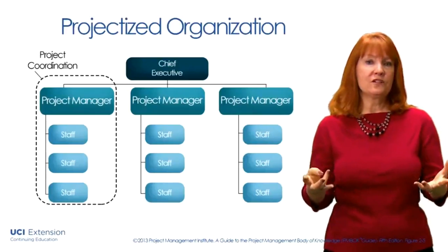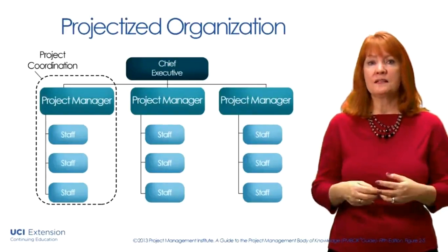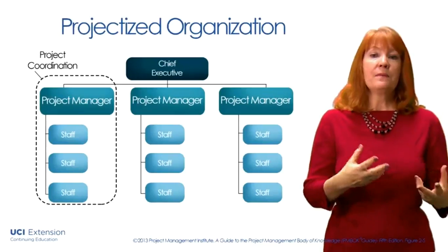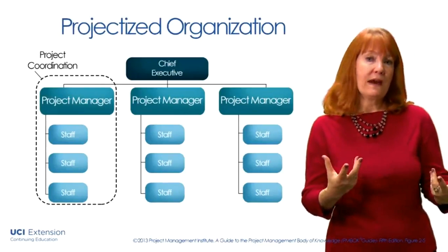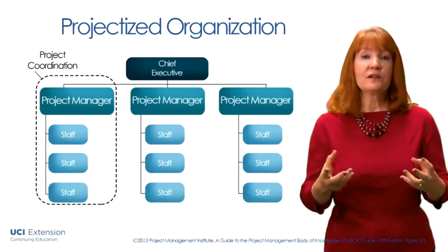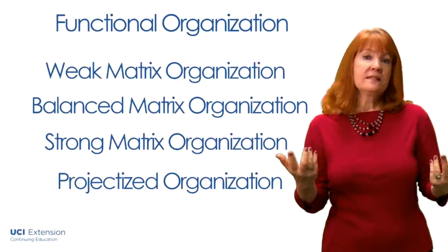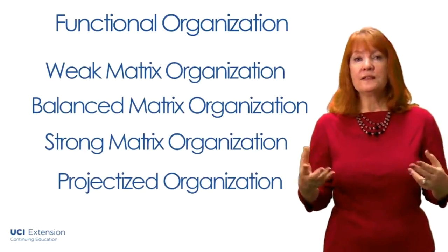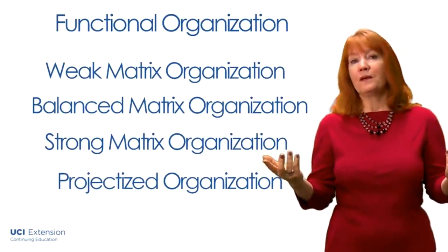Now, a projectized organization is good for a very critical project, especially if time is of the essence. It is more expensive because you take team members and put them all on one effort, and they were doing something before, so you probably have to backfill them. But the project gets all of the focus and attention that's required. There really is a time and a place for each of the project organizations. And in fact, you'll find that some companies may use a combination of all or some, depending on the project at hand.